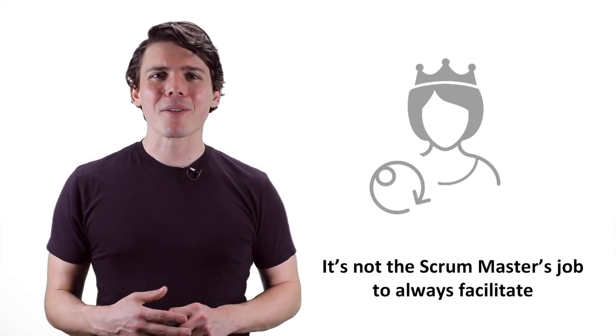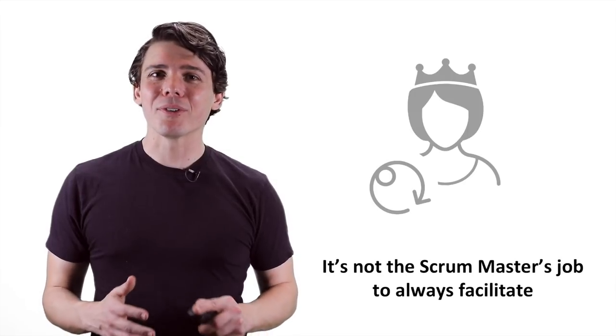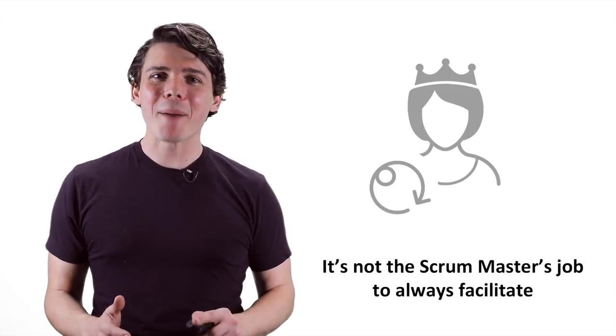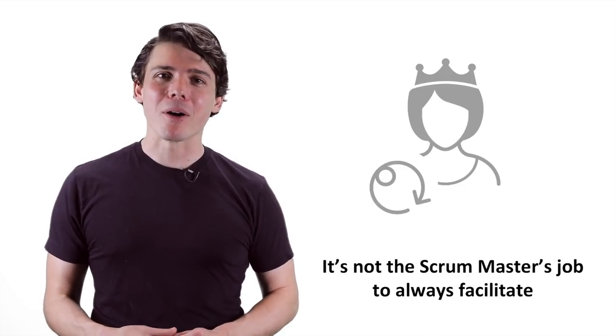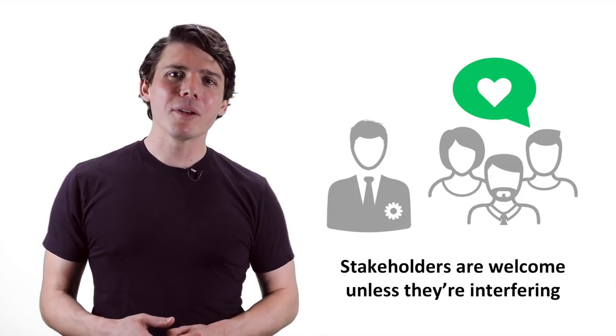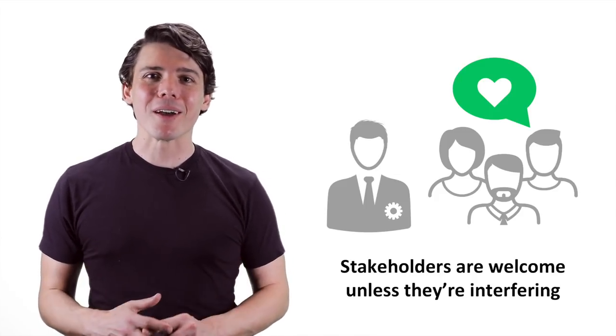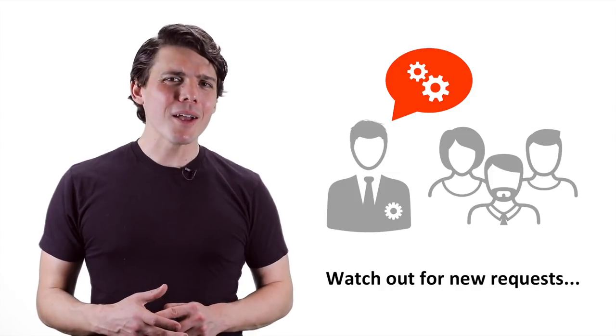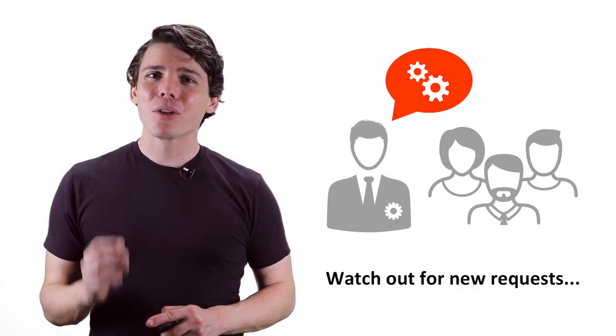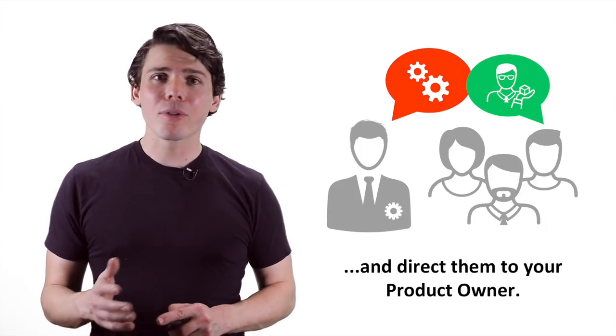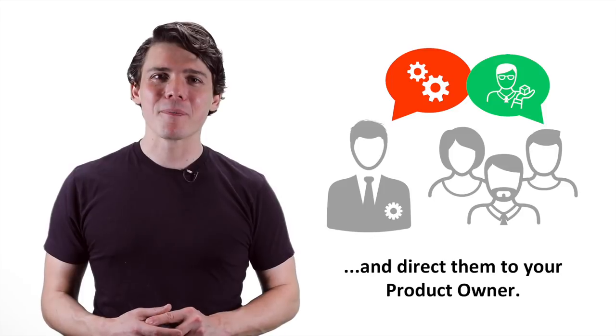A couple of other useful hints. It's not the scrum master's job to always facilitate the daily scrum, only to ensure that it happens smoothly and within the 15-minute time box. Also, people who are not on the team are always welcome to attend, so long as they do not interfere with the event. For instance, watch out for stakeholders demanding status updates or addition to the current sprint's backlog. These sorts of requests should be directed directly to the product owner. That's the essence of the daily scrum. Feel free to experiment with the format. Be sure to track whether or not your experiment helped your team meet the sprint goal or provide an early warning.